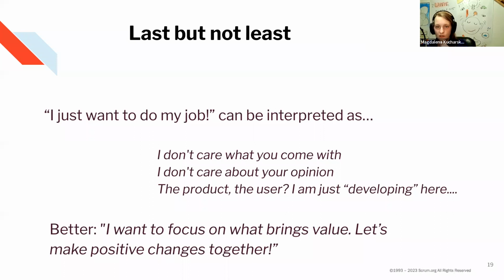And when we gathered that data after a few sprints, the number just kept growing and growing. So it allowed us, for instance, as a team, to come up with an answer to make one person responsible for the communication within the team per sprint, right? And this person was, for instance, answering emails, answering communications that handled the communication outside of the team, so the others can focus. That's one of the metrics that we used.